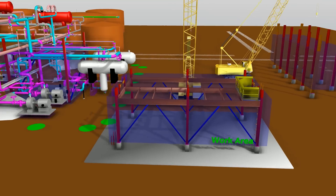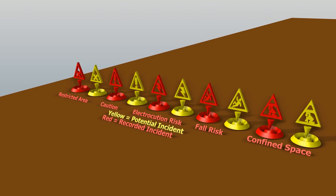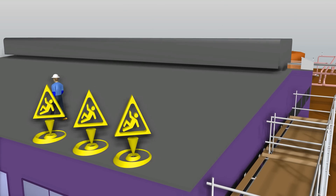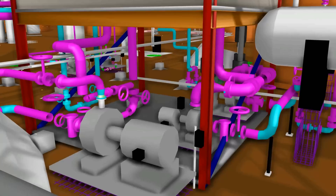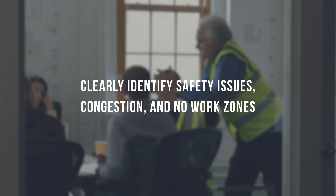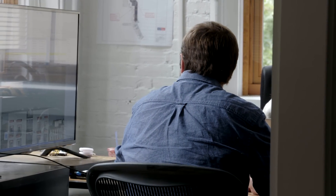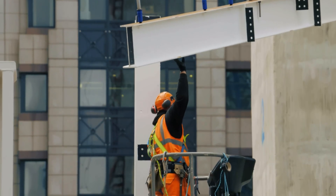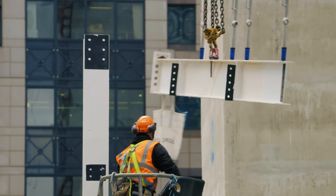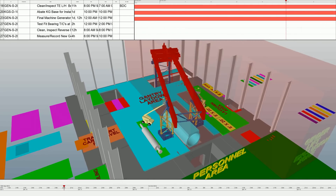If 4D is done right, we can use it as a planning tool to identify safety issues and then actually flag those issues inside the model. For us, nothing is more important than safety. We have hard data for the exact same scope of work between the Fall 2012 outage and the Fall 2014 outage.